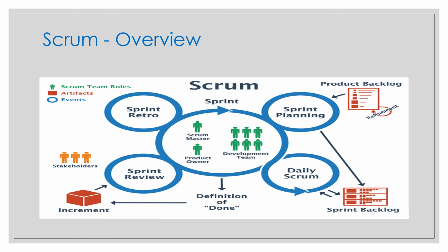So Scrum teams are cross functional, meaning that members have all the skills necessary to create value each sprint. They are also self managing, meaning they internally decide who does what, when and how. The Scrum team is small enough to remain nimble and large enough to complete significant work within a sprint. So typically 10 or fewer people.